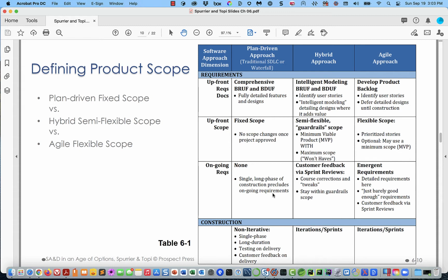No, what they typically do is someone proposes a change, and then the powers that be will evaluate that, say, yeah, that's one we want to consider. And if they want to consider, then, you know, they gather the rest of the requirements. They do the design. They come up with the estimates to implement the software. It either gets approved or it doesn't, and then on they go.